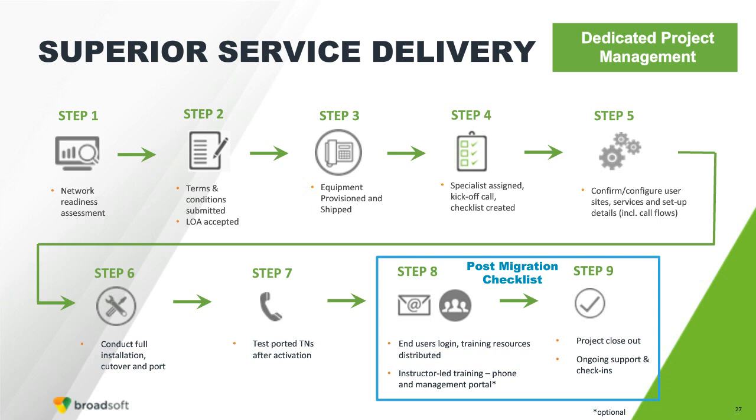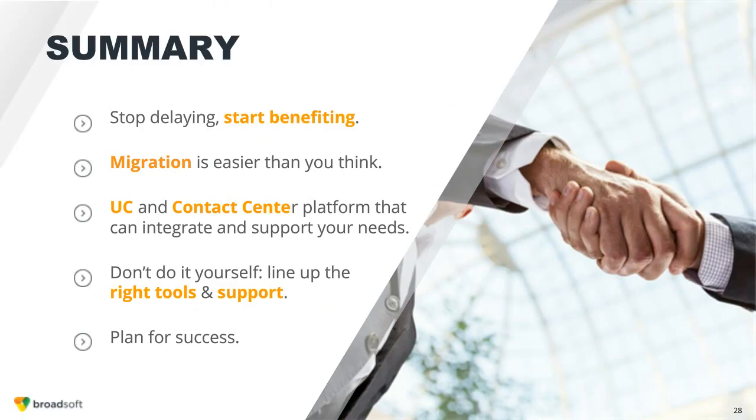Now, the most important thing we consider in a cut is to make sure that we continue to service the users after the cut point. Right at that point, training and the first 30-day assistance is critical for the adoption of these new cloud services. So we think that day 1 through day 30 training and activation assistance is really critical to a successful migration.